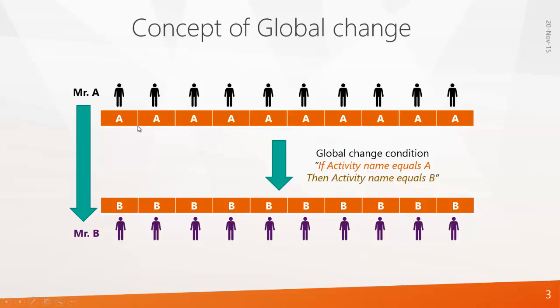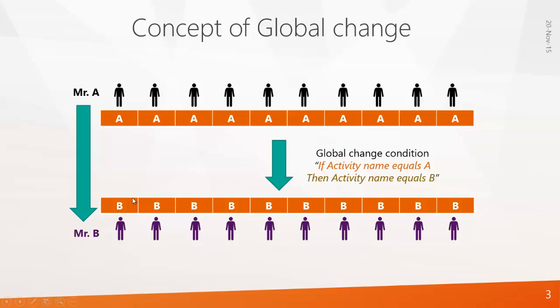Now if you want to change the name of the activity in one shot you can use global change. You can give a condition that says if activity name equals A then activity name equals B. When you do this condition in global change, the program automatically changes the name of activity from A to B.